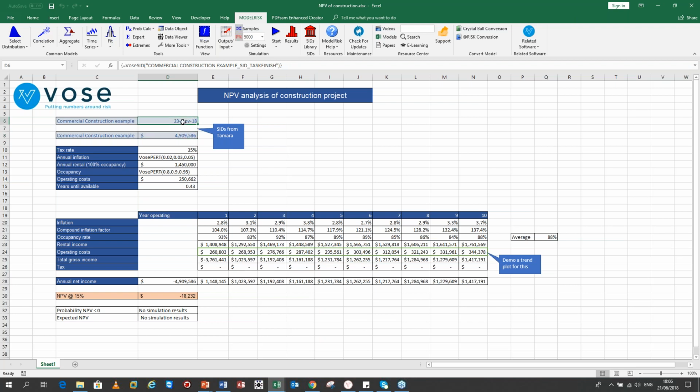It means that if I build some financial model, I'm not going to have these two being inconsistent, like an early finish date but a very large cost, or a late finish date and a very low cost. They're completely connected together, even though there might be separate functions. And because they're separate functions, you can build all sorts of things.